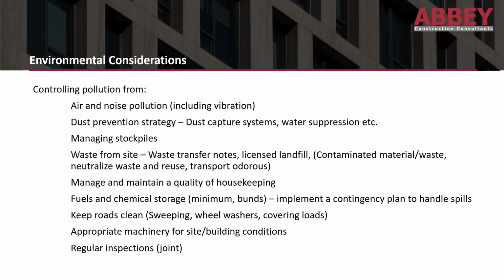Waste from site, have they got waste transfer notes? Is that waste going off to a licensed landfill if it's applicable? How are they managing contaminated material waste? How are they neutralising waste or reusing that material? How are they ensuring the odours aren't escaping during transportation?